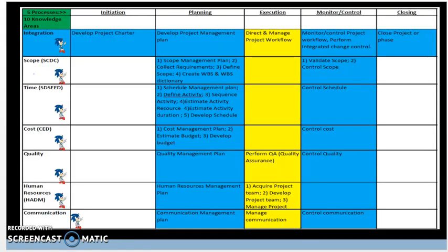So let's move forward. Control cost is the process where we make sure project costs are under budget and within the cost baseline. We use forecasting methods such as variance at completion, estimate at completion, estimate to complete, and earned value management such as cost variance and cost performance index to see if the project is doing well or not. Otherwise, we raise a change request to make sure that we can fix the budget.